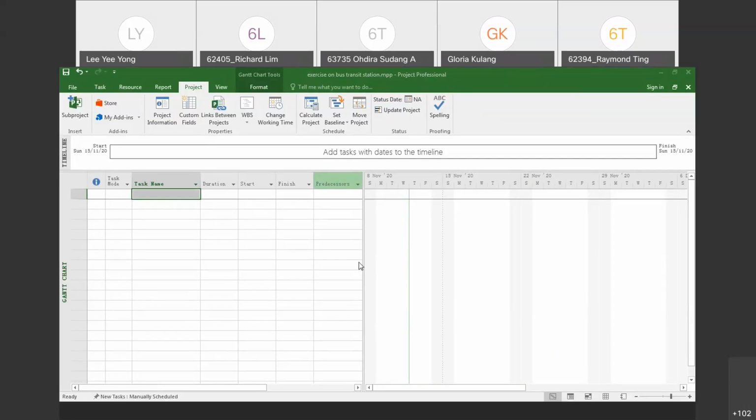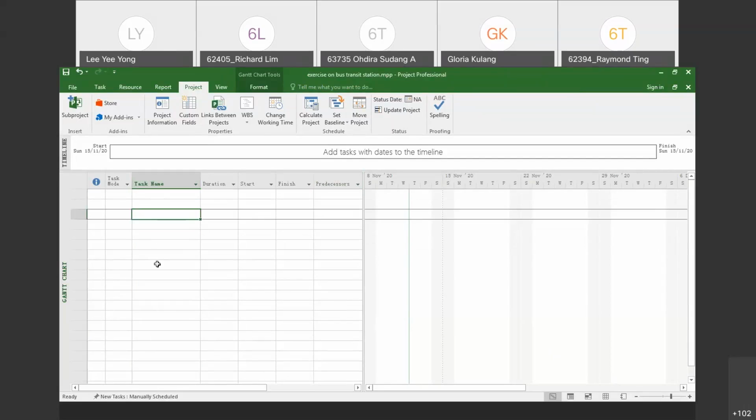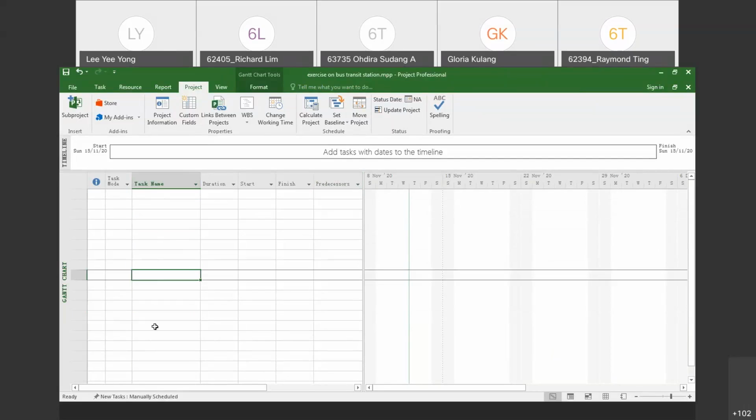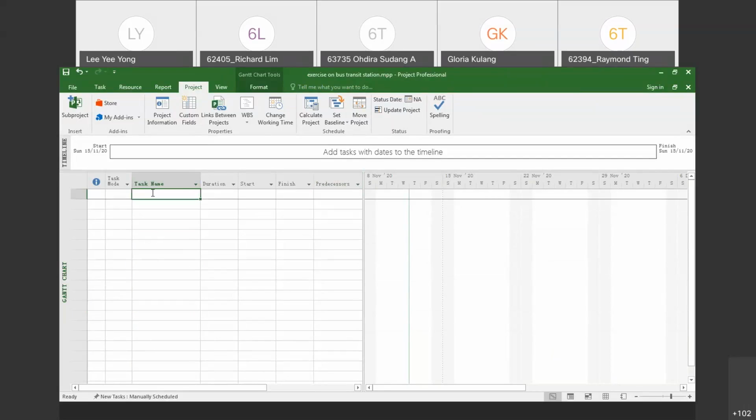Again, when you want to create the task, go to the task name column. You must follow the sequence. You cannot start here first and then go back up and down. Go by sequence, because for every task name that you click on in each row, an ID number will be assigned here. Let me type. Okay, look back to your hands-on.